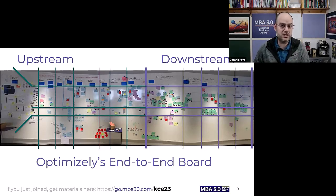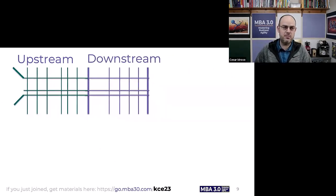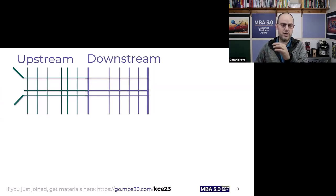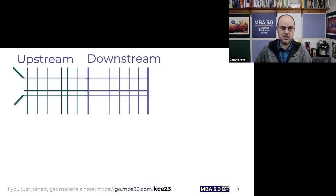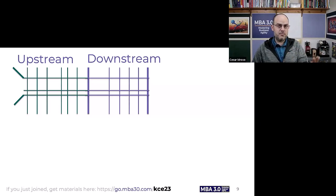You might recognize the board, but I did my best to fix the fisheye effect of the original. This is in some of the learning material from Kanban University, which several people here are accredited to teach — myself included. What this shows is the full end-to-end from upstream all the way to downstream. The downstream starts where things go from on-deck to in-development, and the upstream is everything from the highest-opportunity funnel right at the beginning through all the stages where work might mature.